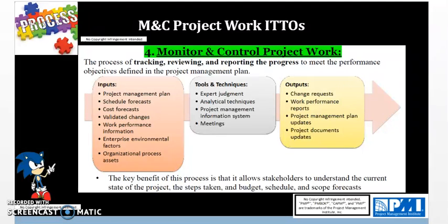Fault tree analysis is where we have gate symbols that describe the relationship between input and output events for each risk. So here we have Boolean logic such as AND or OR symbols, and it tells us which way we're going based on a risk. The other pieces that we have for tools are going to be trend analysis, which is basically a view of data over time, and variance analysis, which is comparing the actual versus the baseline. So the planned results in the baseline versus the actual results that we have incurred.